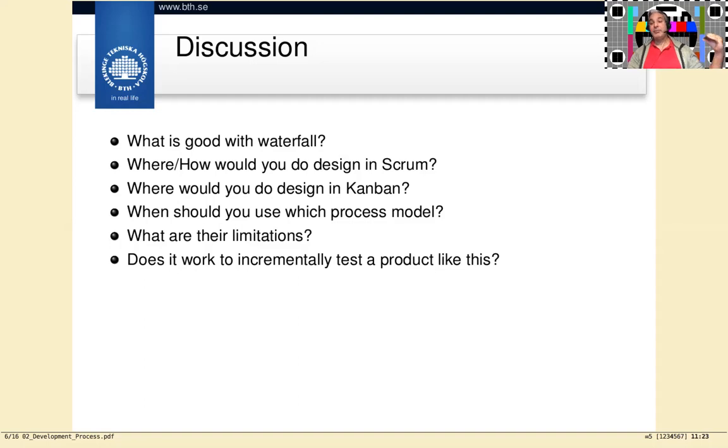That would be a user story or several user stories that as product owners we want to test the system so that we don't release software with bugs in them. And as you're approaching a major release, that user story would become the top priority, and that would mean that you would pick that user story over any new development, and you would do that. But that's how we do it.